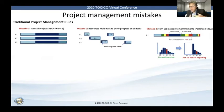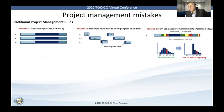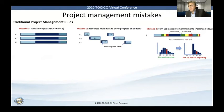We know what happens if you start turning estimates into commitments. The estimate was that this task under perfect conditions would take about 10 days, worst case about 50 days, and a likely scenario around 30 days. If a team completed it in 20 days but made a commitment for 30 days, they don't want to be viewed as unreliable — they don't want the next time they give a 30-day estimate to have it cut to 20 days. So there will be an incentive for them to report it as 30 days rather than 20 days.